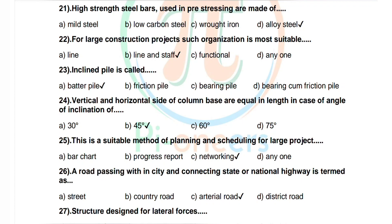Question 24 (continued): Correct answer is 45 degrees. Question 25: The most suitable method of planning and scheduling for large projects. Options: bar chart, progress report, network diagram. Correct answer is networking.